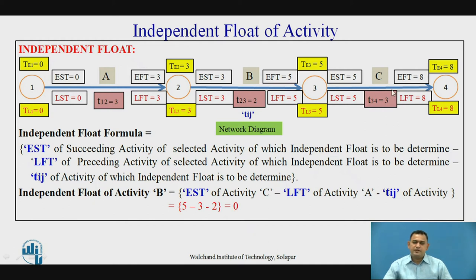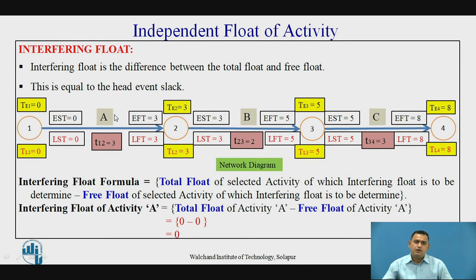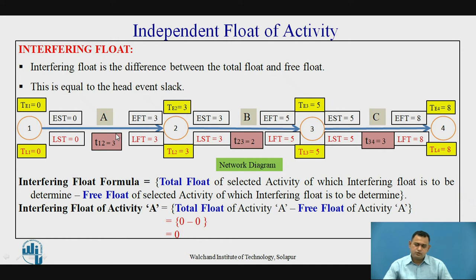The interfering float is the difference between the total float and the free float. It is equal to the head event slack. For activity A, the interfering float equals total float minus free float, which is 0 minus 0 = 0, because activity A is a critical activity.